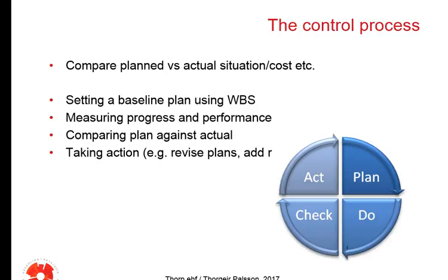Setting the baseline using the work breakdown structure. The baseline would be the total cost of the project, after having done the first step, the work breakdown structure, and then added the cost onto the deliverables and work packages, and put in the time scheduling, etc. Measuring progress and performance, comparing plans against actual, and then of course taking action.